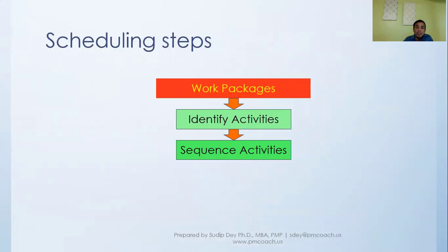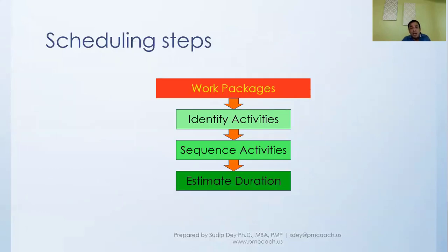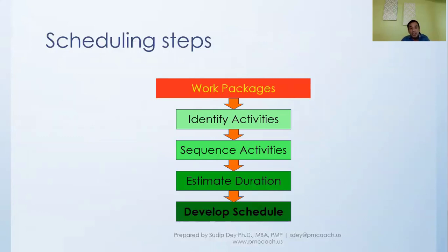Then for each activity that we have identified, we'll determine the duration, how much time each activity will take. Once we have the activities, the duration, and the sequence among them, we can put them together and develop our schedule, which will be the basis on which we move forward in the project.